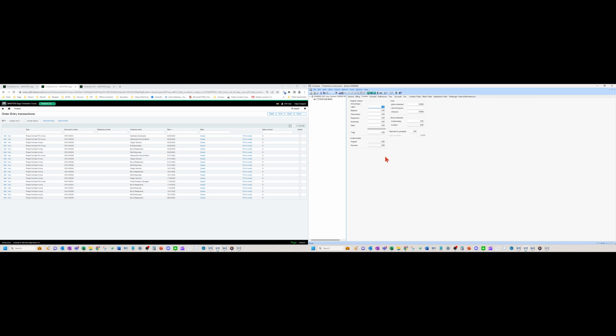Because time and material, you don't necessarily know what your contract amount is, right? It's time and material plus a fee. Okay. So in Sage 300, Intacct has this as well. In 300, you have rate tables. So on my labor, material, subcontract, equipment overhead, I've got some rate tables assigned here. Okay.